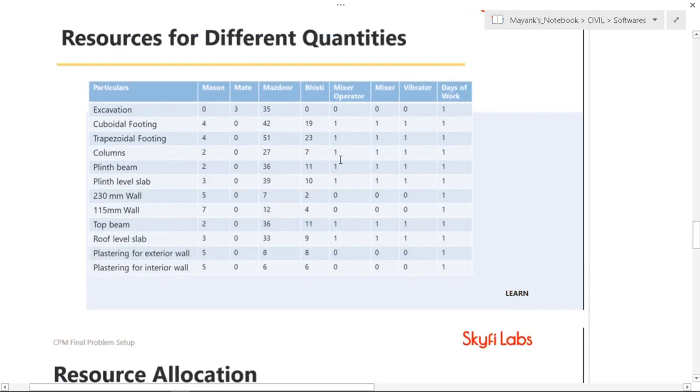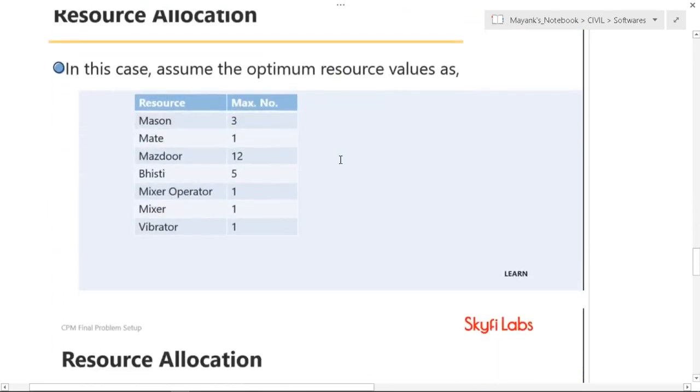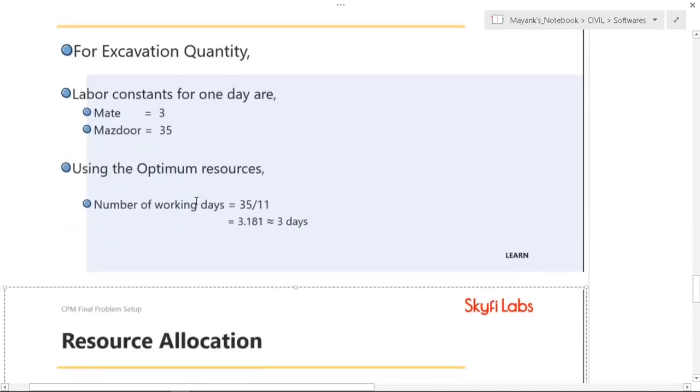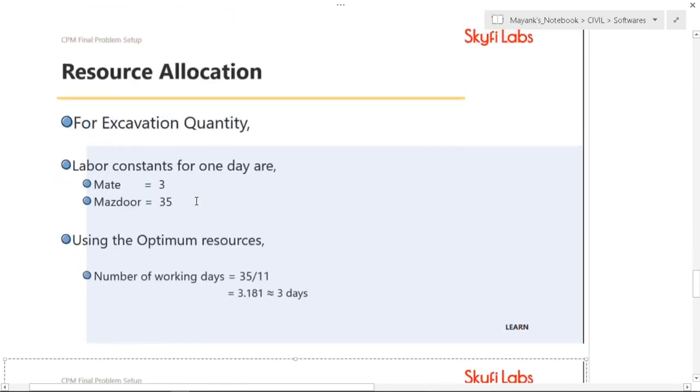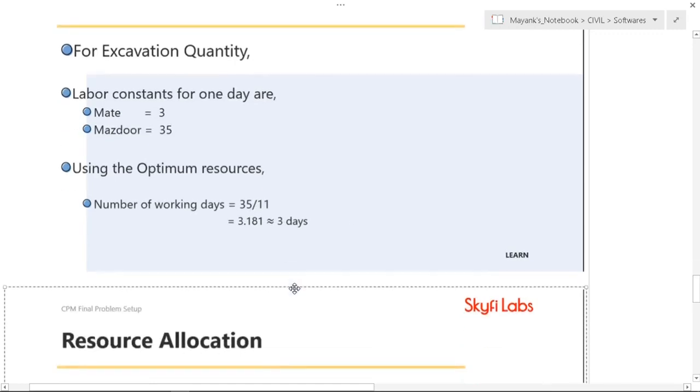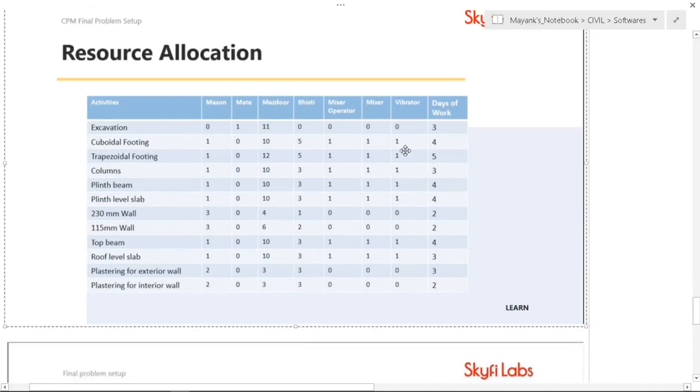We have assigned an optimum value for these different types of masons and material and labor. So the number of days for each labor or material is defined as total number of labor divided by the optimum number of labor. So by this we can calculate the number of working days. These are the resources allocated.